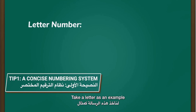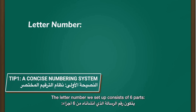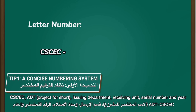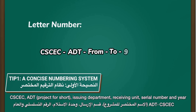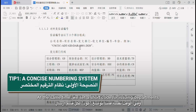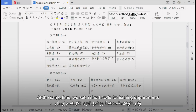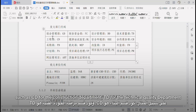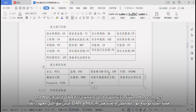Take a letter as an example. The letter number we set up consists of six parts: CSCE, ADT project for short, issuing department, receiving unit, serial number, and year. At the same time, we set short codes for issuing departments, such as CD for construction department, TD for technical quality department, and NUCA and DARF for owners and supervisors we often contact.